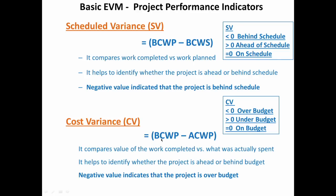Similarly, cost variance is budgeted cost of work performed minus actual cost of work performed — the value you got for the work you did versus the money you spent. Cost variance less than 0 means over budget, greater than 0 means under budget, and equal to 0 means on budget.